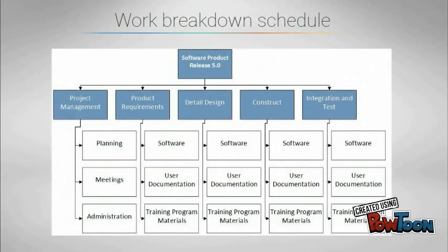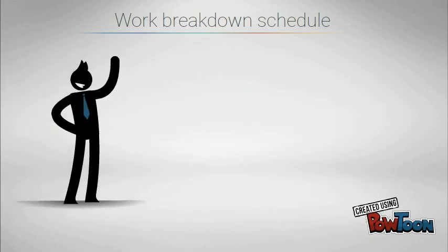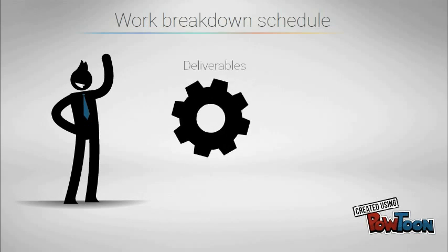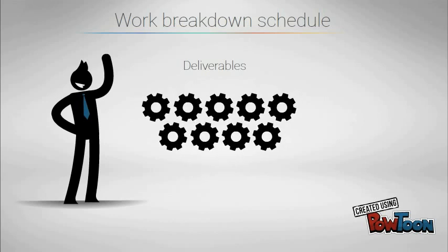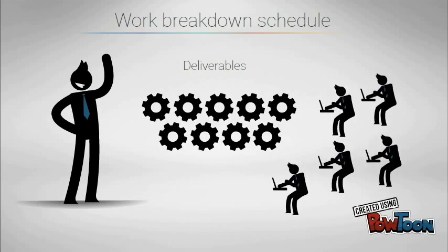A work breakdown structure is a key project deliverable that organizes the team's work into manageable sections. It visually defines the scope into manageable chunks that a project team can understand, as each level of the work breakdown structure provides further definition and detail. The project team creates the project work breakdown structure by identifying the major functional deliverables and subdividing those deliverables into smaller systems and sub-deliverables. These sub-deliverables are further decomposed until a single person can be assigned.